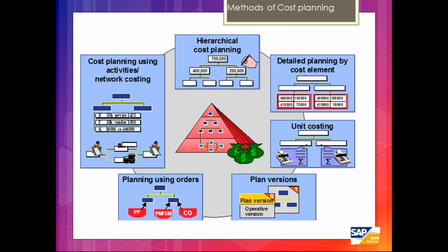Then we have activity-based cost planning, like I have just explained. Like if I want to do any procurement process or travel expenses, those kind of things can be done against this network-based cost planning. Along with that, we have another cost planning like easy cost planning. It is also grouping wise, but through that we can also create purchase requisitions or purchase orders, and goods reservations also.